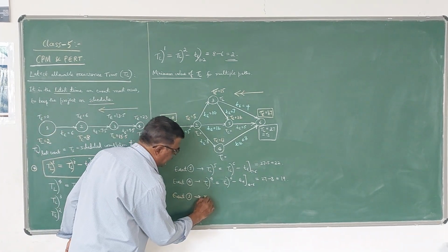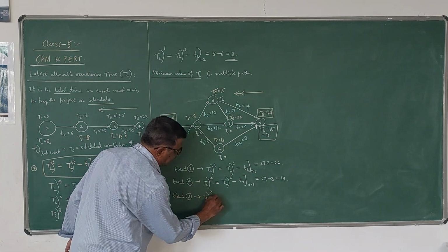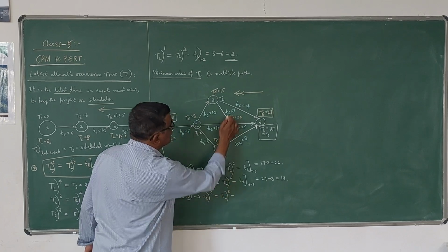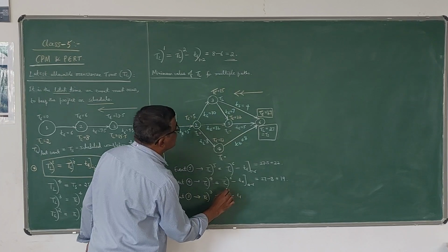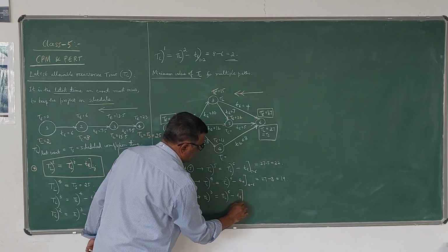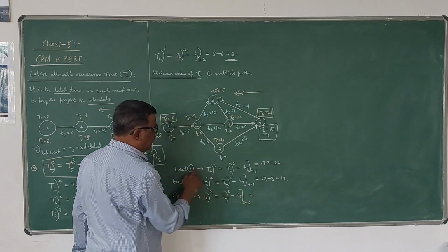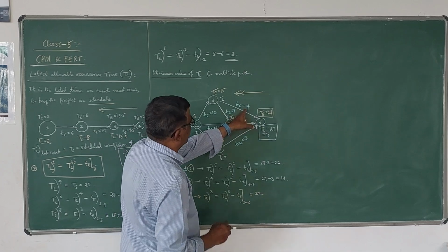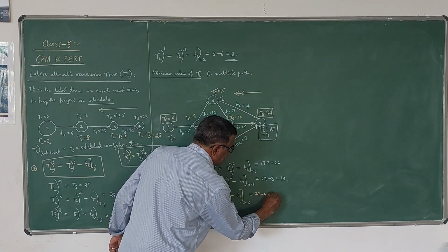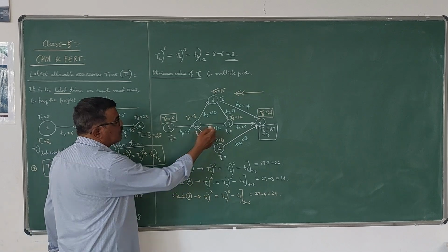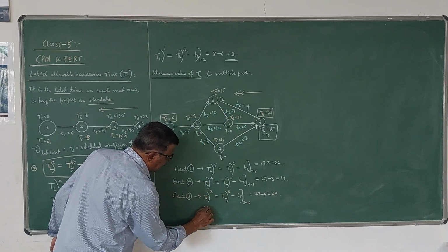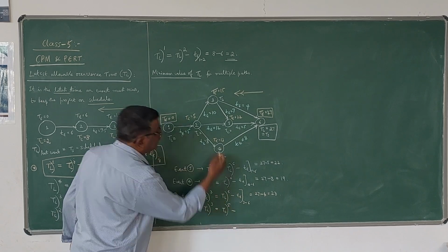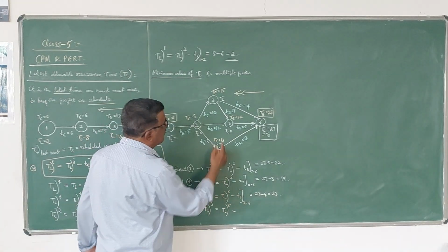So here for event 3 I can write like this. Suppose if I take this, TL3 is equal to TL6 minus t of 3, 6. So TL6 we know is 27, minus t of 3, 6 which is 4. So it is 23. Next, by taking 3, 5, TL3 can be found out by taking TL5 also. We are going backwards like this. TL5 minus t of 3, 5.